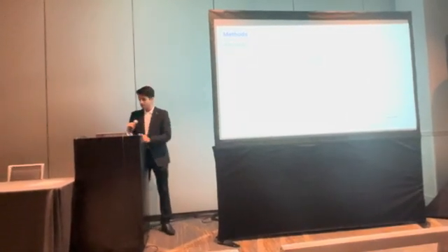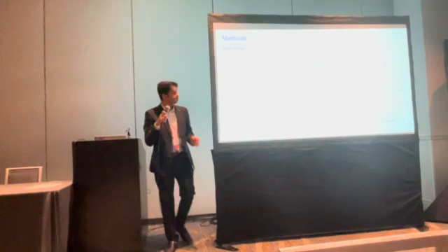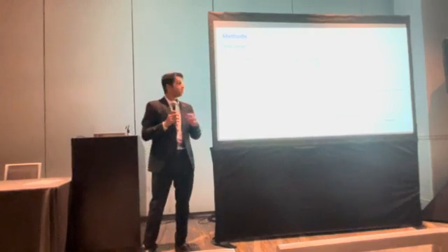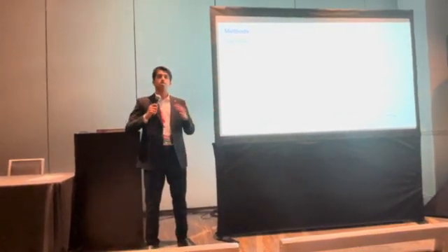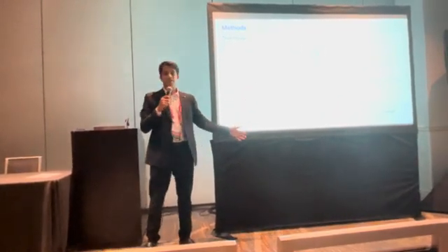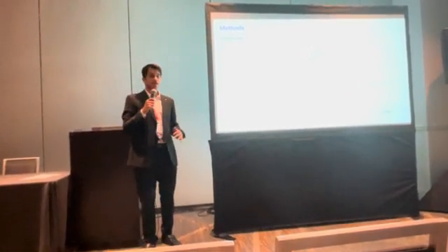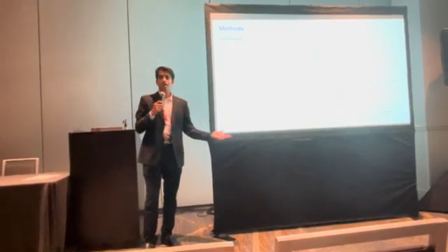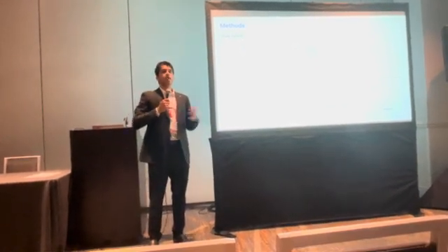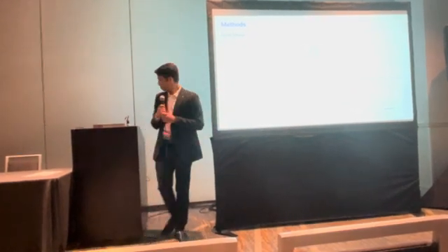So this is the study design over here, where we divide the study into 4 different phases. So phase 0 is mainly dedicated to contextual inquiry and understanding the workflow of the system, and then the sprints are part of phases 1 and 2, where in phase 1 we develop project management and business administration functionalities, and in phase 2 we develop the intake process of the system. And then phase 3 is mainly dedicated to refining the system and also maintaining whatever we built so far. And the final phase is mainly for reviewing the project and also closing it.